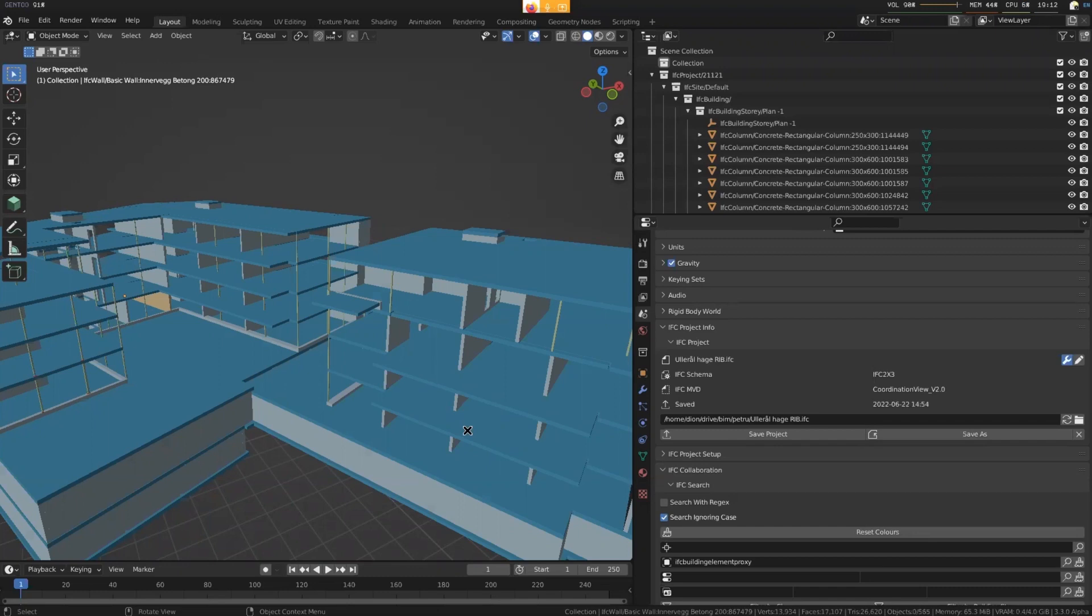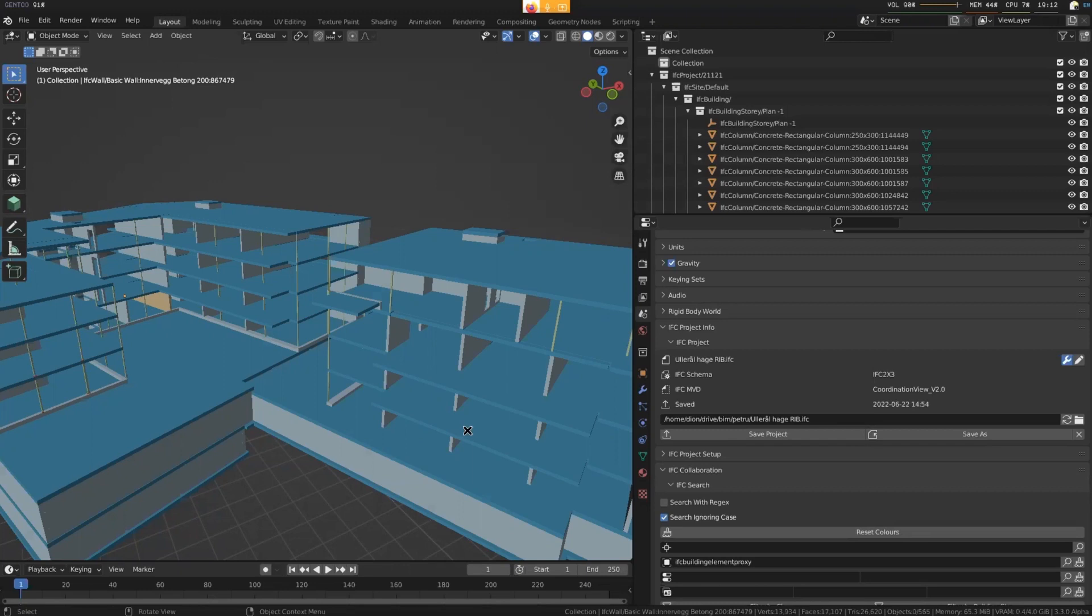But is it actually anyone using this, Liam, scheduling through IFC? Do you have any examples? Are there, can I find any place where I can read more about this? Sure. So Synchro and Bexel are probably the two big companies which use this, the two big proprietary ones. Of course, Blender BIM does it, but you knew that. Clearly, somebody's making money off it, right? People are paying Bexel to be doing this. So I dare say almost all of Bexel's customers would be doing it.